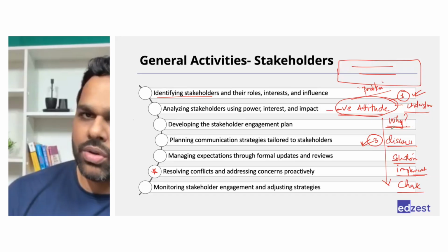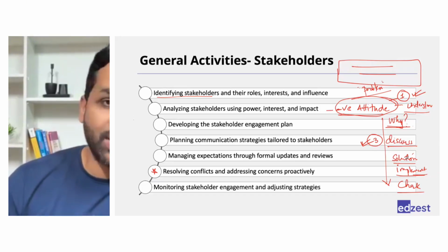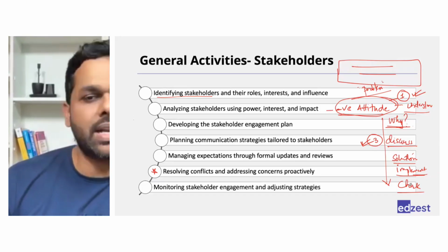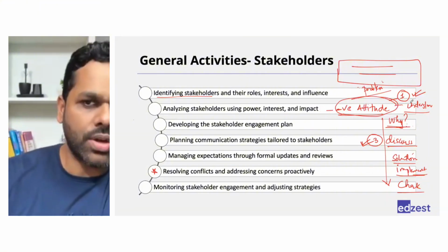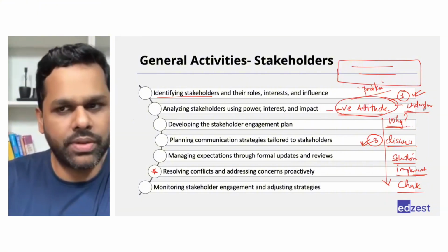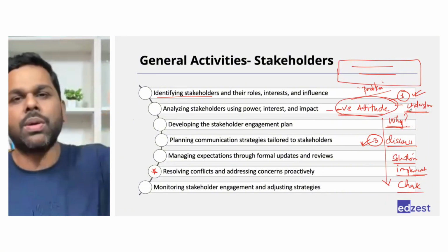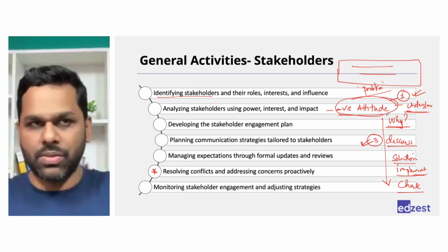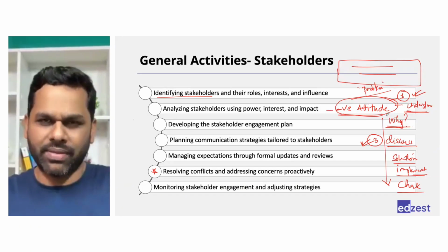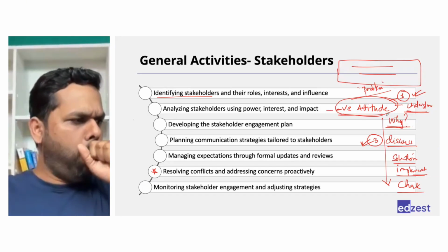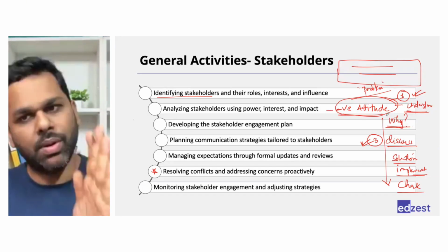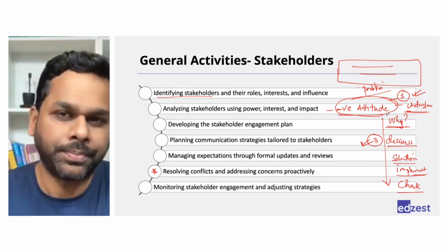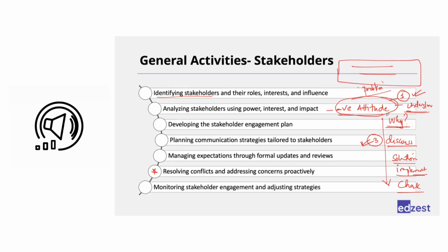then you figure out the root cause, then you discuss possible solutions, then you decide one solution, implement it, and check it. So the answer to your question is that first you will discuss with the same person with whom the problem has arisen, so that you have a good understanding of what the problem is, why they are not happy, why they are negative about the project. If you understand that well, you will be able to solve the problem better.